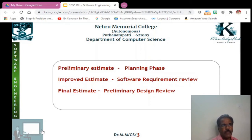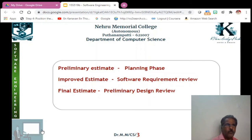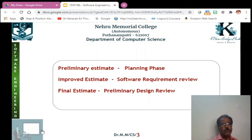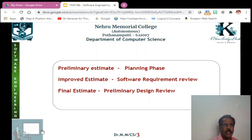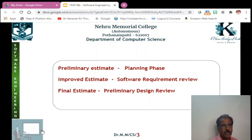We should have a first-hand estimate for software development, and at the time of the software requirement review we can go for enhancement of the cost estimate. We can add additional components and have a more actual estimate of the cost, but that is still not final. Once the preliminary design is done, only then can we have a final estimation of the cost involved in software development.